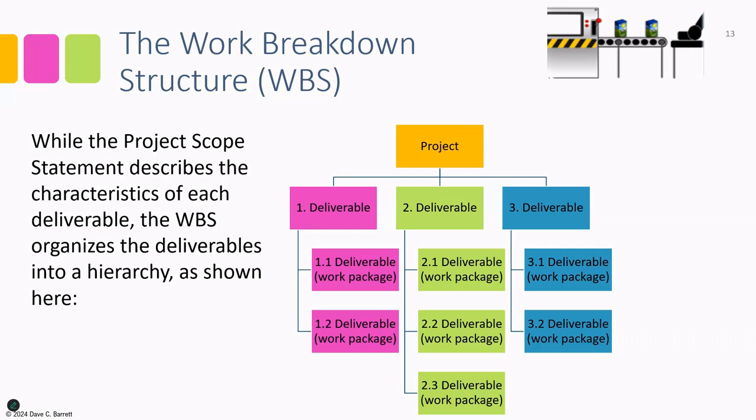Now, the smallest deliverables at the bottom of a work breakdown structure are referred to as work packages. So that's something to keep in mind, is that they are referred to as deliverables, but also as work packages. Now, the top of the work breakdown structure will have levels.